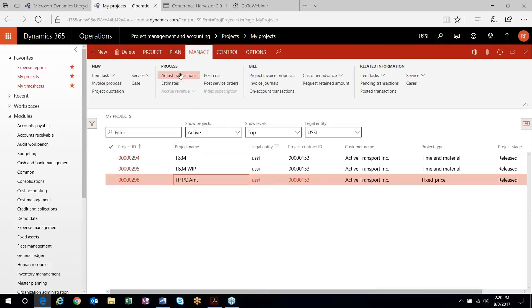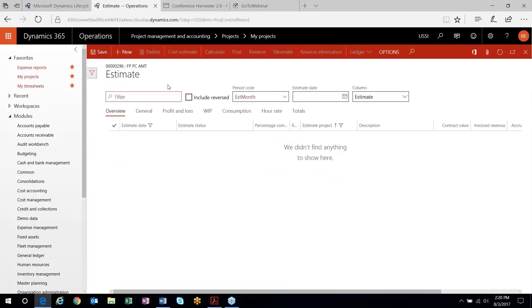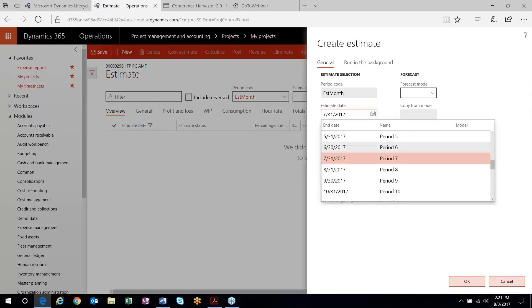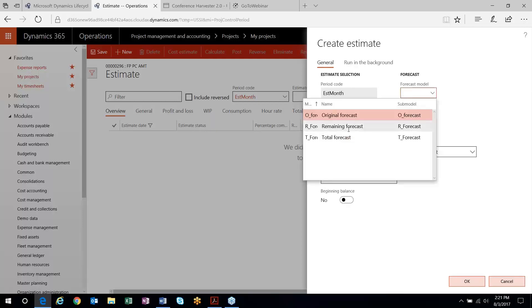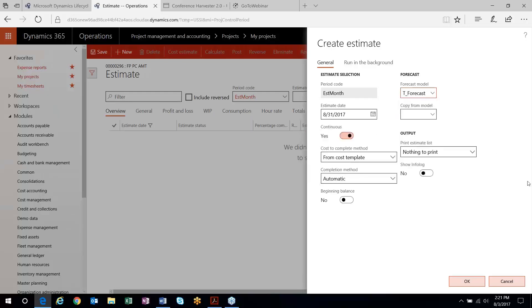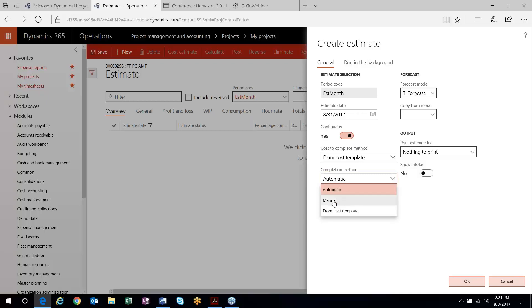For fixed price projects, the process is kicked off through the estimate functionality in the system. Each month you come out here and create a new estimate. I'm going to choose August because that's where I posted my time, and I need to choose the forecast model where my actual forecast is stored. The cost-to-complete method comes from my cost template. The completion method — automatic versus manual — is just saying: do you want the system to calculate your percent complete, or do you want to manually input it afterwards?